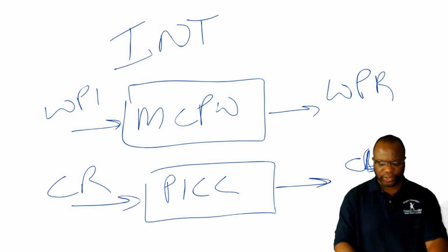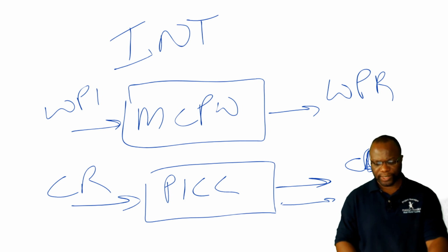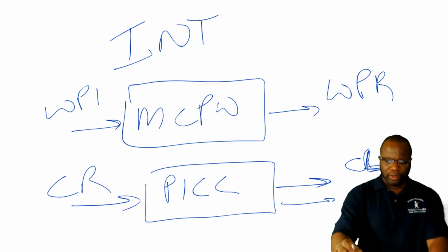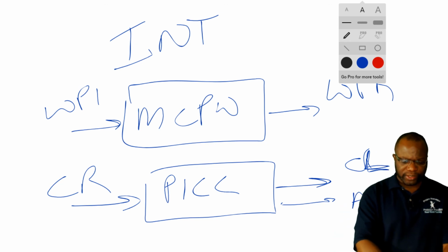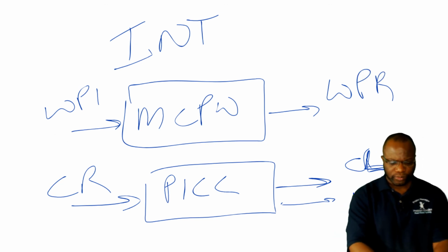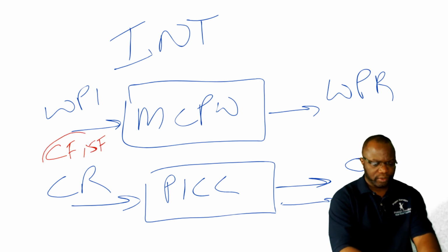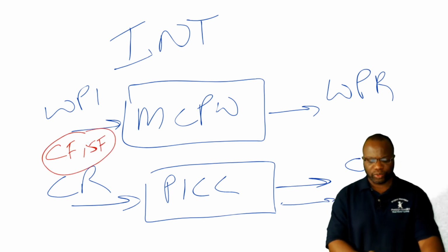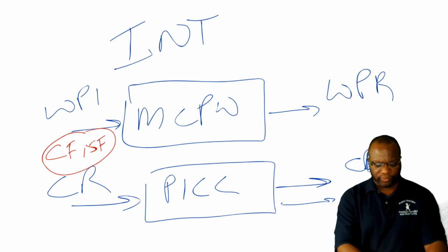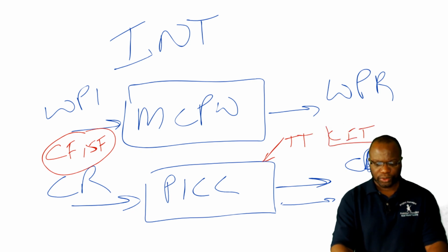Okay, so change requests going in, change log coming out, and you also have the approved change requests coming out possibly. Okay, when you think about how these processes are special, you've got cost forecast and schedule forecast going into monitor and control project work. And of course, as a tool and technique, you have change control tools.